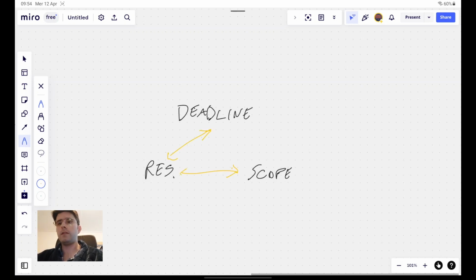For instance, if I'm building a home and I choose to make a 3-story building with a garage, that is definitely going to take longer and more materials than building a shack. In most projects, one of the things that is defined is the scope, what we want. Normally we start from there. And then some negotiation starts to understand when it can be done and how.